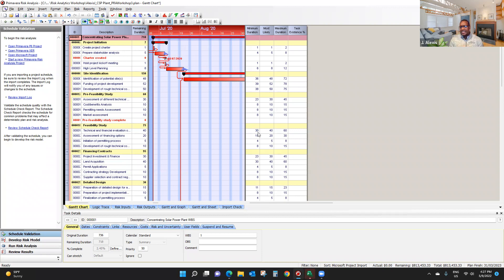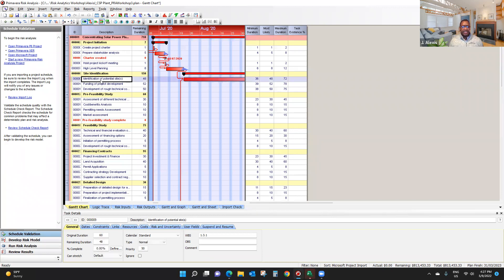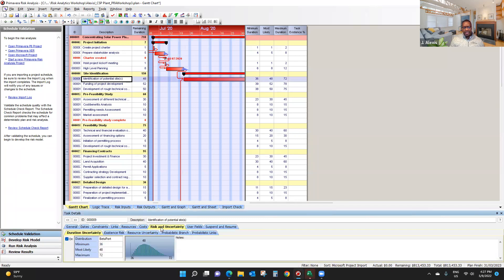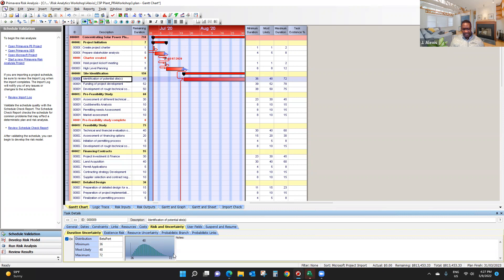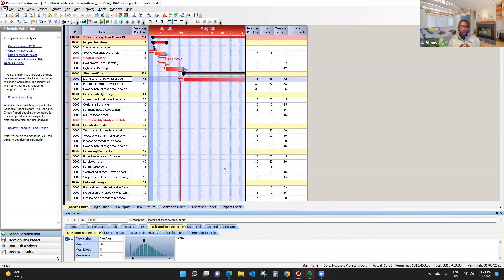So this is how we create uncertainty in a project. For example, if you click on any activity here, and you click on risk and uncertainty, as you can see, I have a beta pert estimate with a very thin tail, and with minimum, most likely, and maximum duration. So this is how we perform, or we model uncertainty in our project.